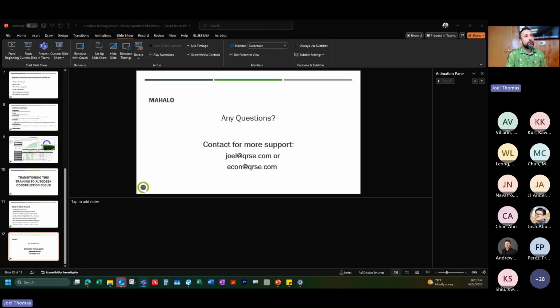It seems like we allow Excel for 3-week look aheads, but specifically for the progress update schedules, it is in the spec. Another thing I would recommend enforcing: we had a project on Kauai where halfway through, their scheduler moved on to another project, and the new scheduler only knew Microsoft Project. So they switched from P6 to Microsoft Project, and that messed up our ability to compare in ACC.